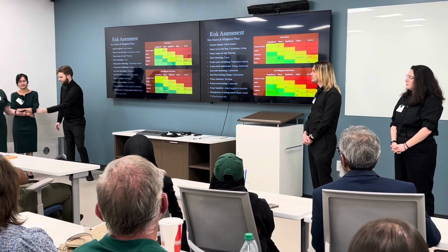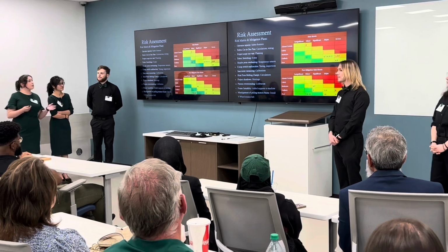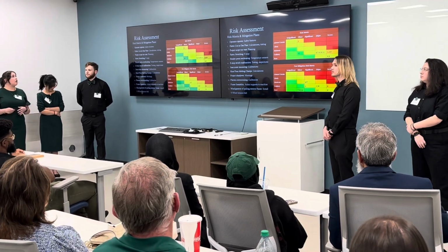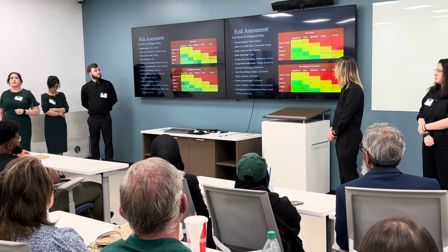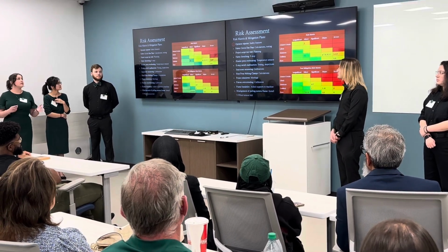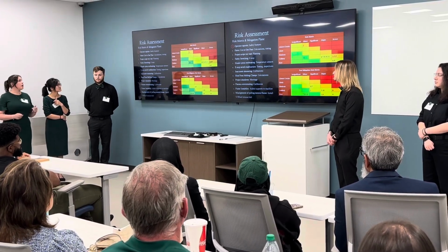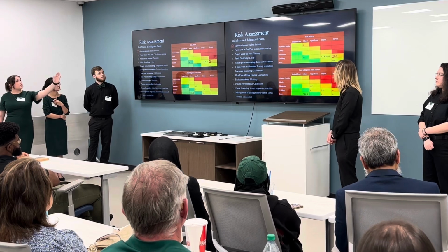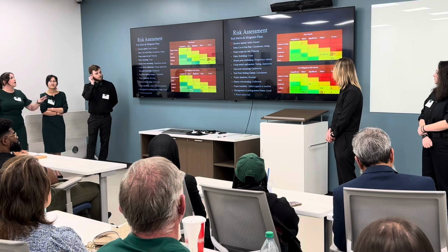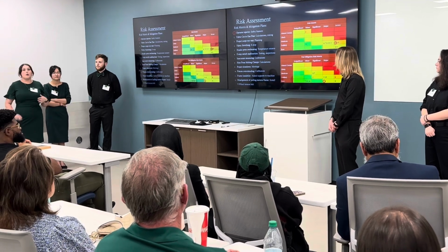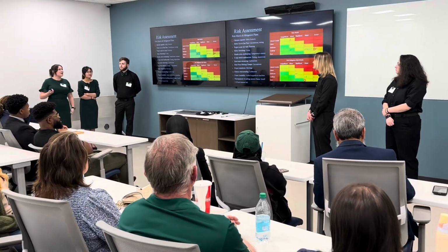All right, on to risk assessment. Like with any project, there are many risks involved, so we made a list of them. I'm going to highlight a couple of them today. The first one is operator injuries, which is a major concern and was highly considered during the design of our product. As you can see here, it started in the severe and unlikely category, but after mitigation and adding safety features, it moves to major and rare, which is as good as it can get at this point.